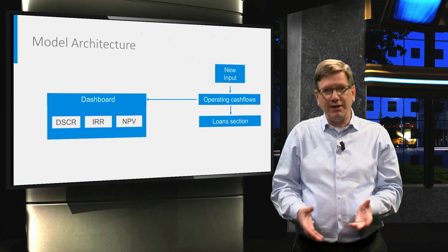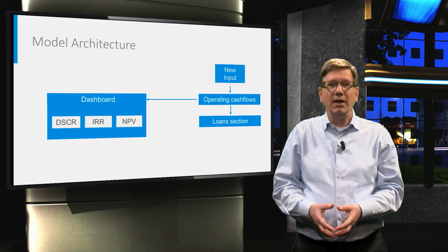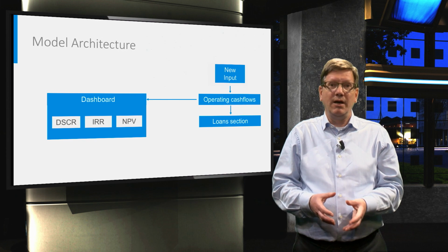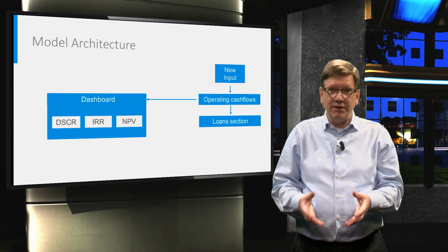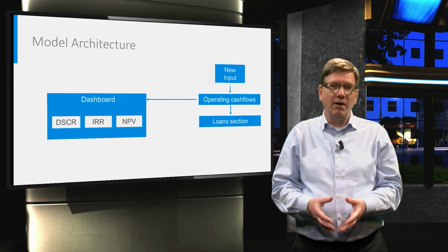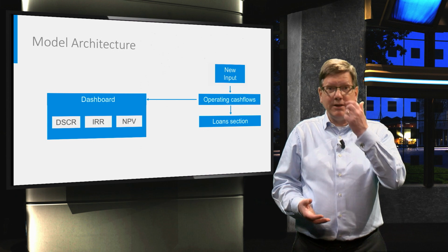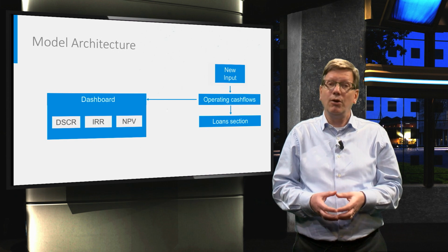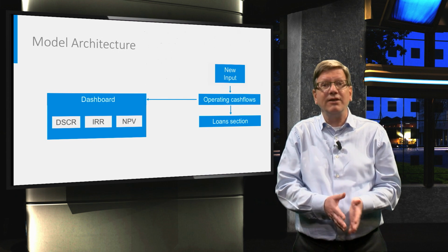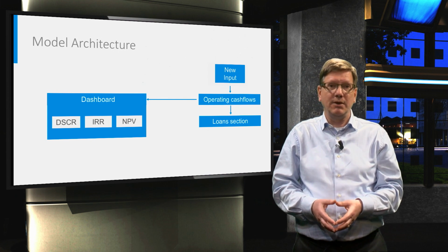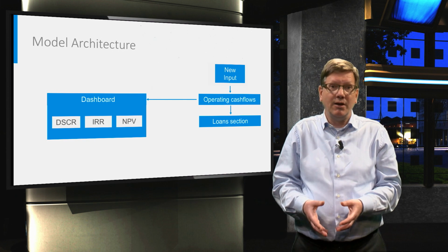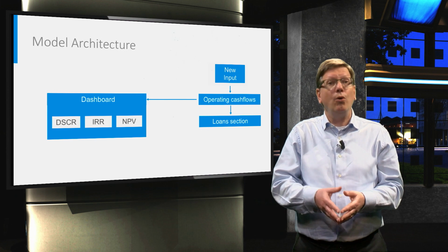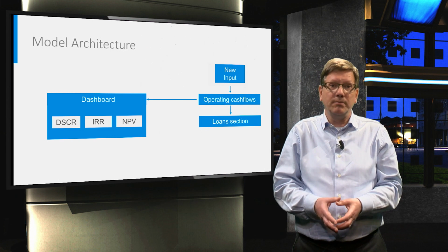The dashboard, as we saw, is a tool for that. It contains those inputs that we want to analyse. The dashboard enables changes for each input. For example, we can run a scenario that the construction costs increase by 10% or that the completion is delayed by 6 months due to unexpected events. We can either change the construction cost input or the completion date in the model.